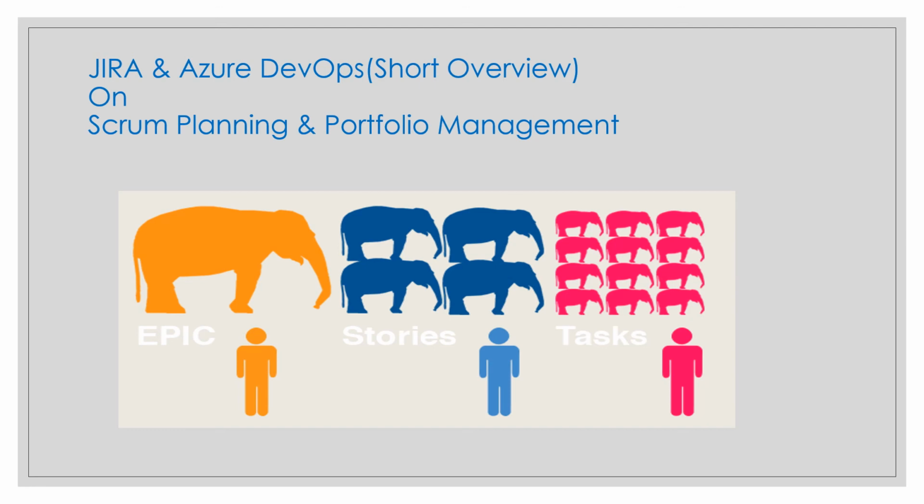Velocity chart will measure the amount of work the development team can handle during the sprint. It will provide you the performance, how we are doing, and how near we are to the goal. During the sprint planning meeting, the development team will select the number of PBIs and user stories, with the estimation and story points, how much time they take to complete each user story, and the total number of story points of the sprint.